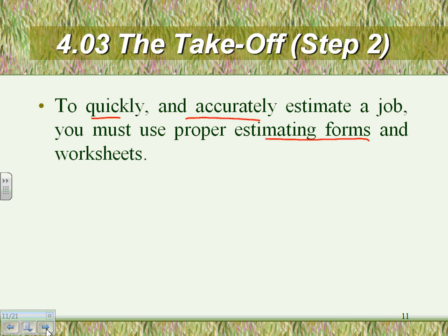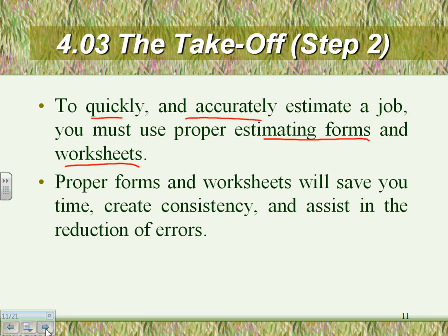That's where the forms and the worksheets come in very handy. Forms and worksheets. It's not enough just to sketch it there, and if you made a mistake, God forbid, it will take an act of God to figure out where your mistake is. Proper forms, guys. The whole idea about the forms and the worksheet is to create consistency and assist you in reduction of error. Your job when you use the forms, guys, is to do it fast, quick, accurate, and if you made a mistake, you'll be able to track that mistake much faster.